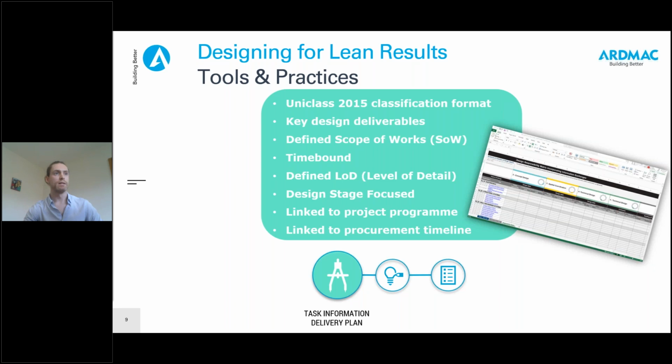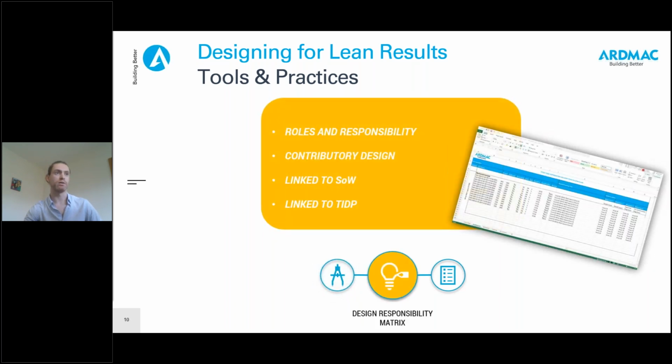Information Delivery Plan. This defines design outputs under naming standards in compliance with ISO certification. It is important that the management tool is live, accessible, maintained and reviewed by the broader delivery team on a regular basis. The TIDP is most valuable when interlinked with an equally valuable design responsibility matrix, or DRM, incorporating information exchanges and clarifying the level of detail required from contractors, consultants and suppliers.